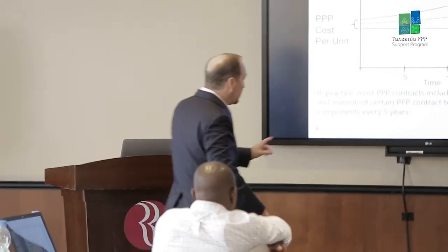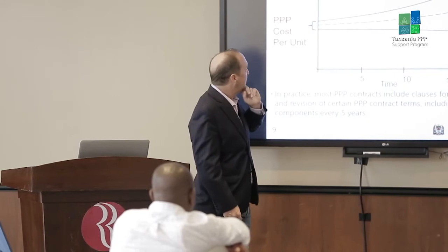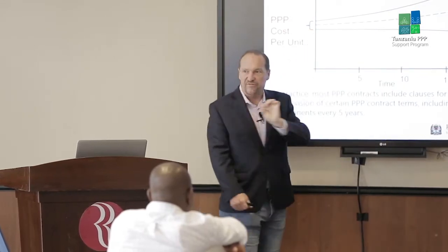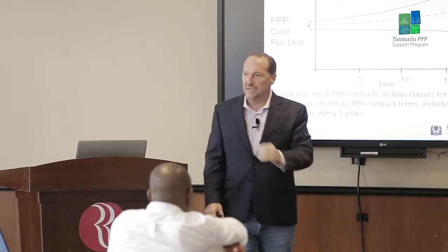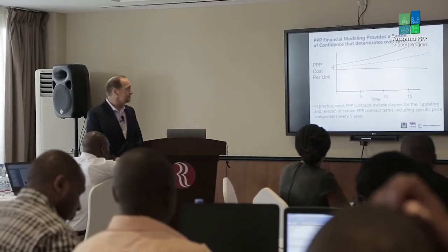But there needs to be at least mechanisms and techniques for fairly adjusting prices during the term of a contract. Again, it's oftentimes difficult, unless it's just a single purpose project company, to have one price or one formula that takes hold and stays the same for 20 years. A lot can happen in 20 years.